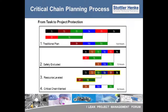Finally, the critical chain is marked. The critical chain is the sequence of both precedence and resource dependent tasks that prevents the project from being completed in a shorter time frame given finite resources. This is the same as the resource-constrained critical path using aggressive durations.